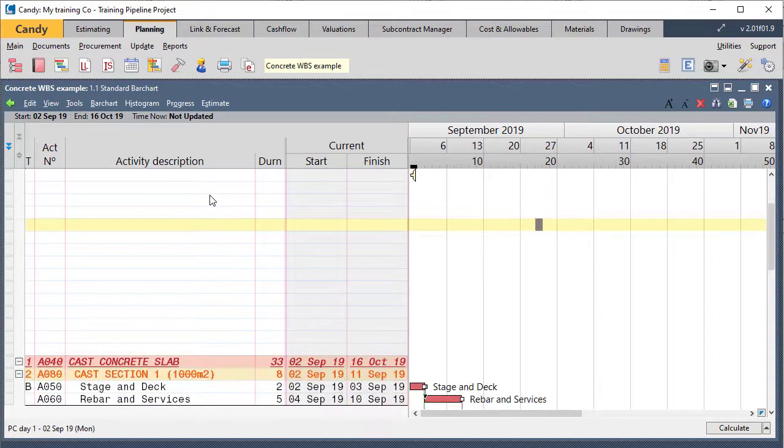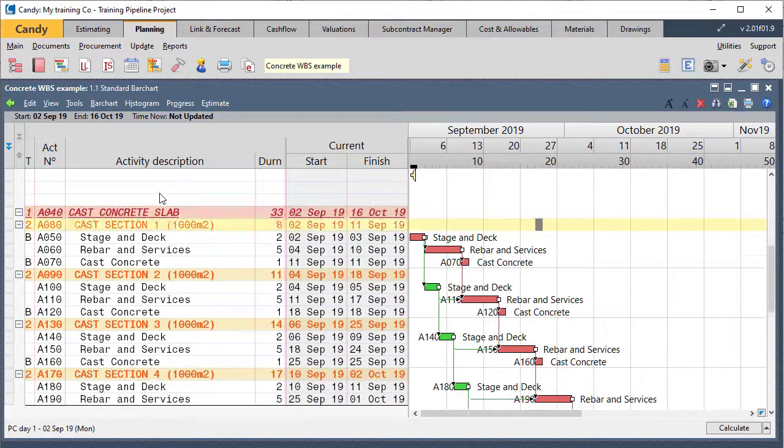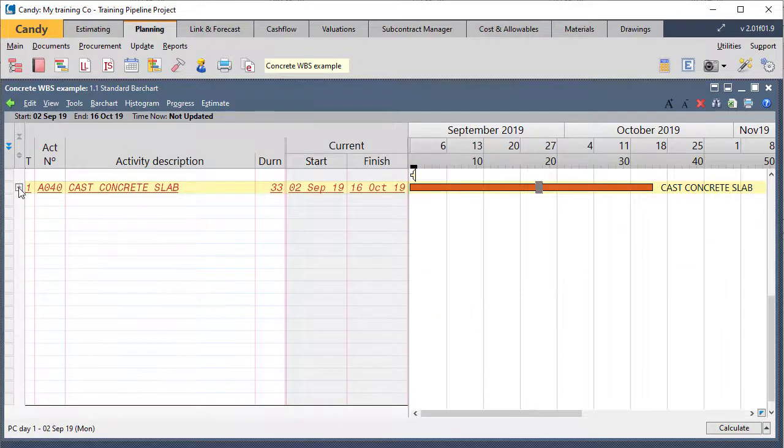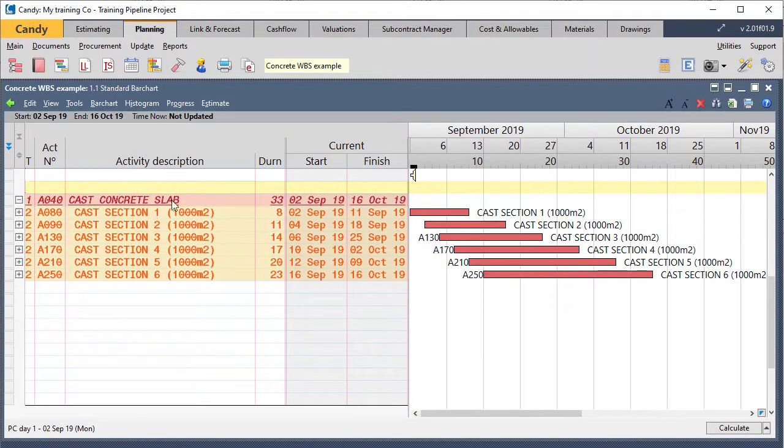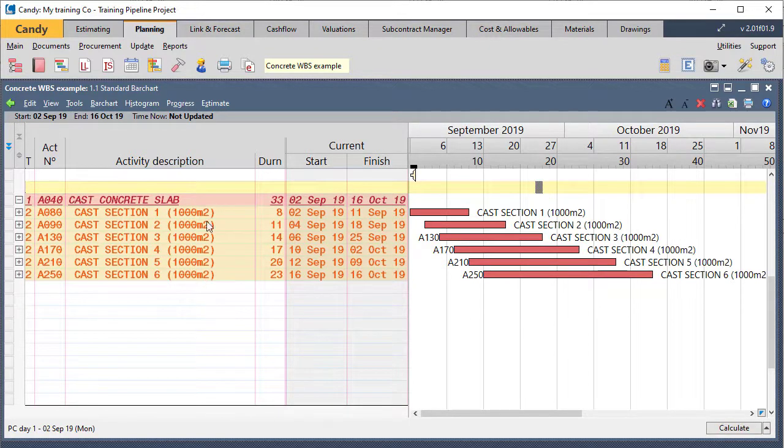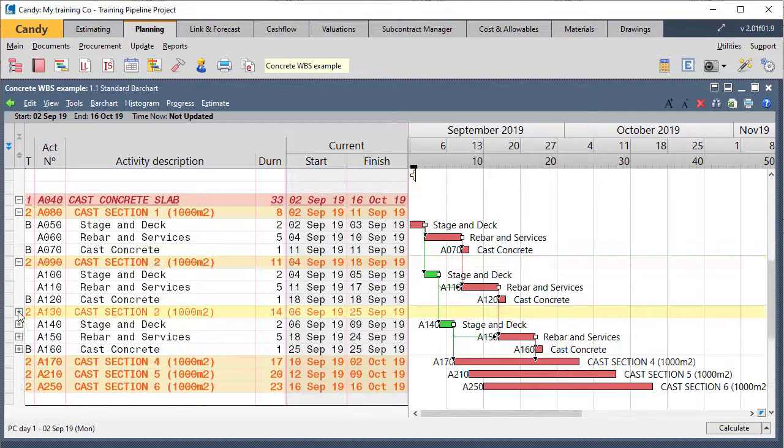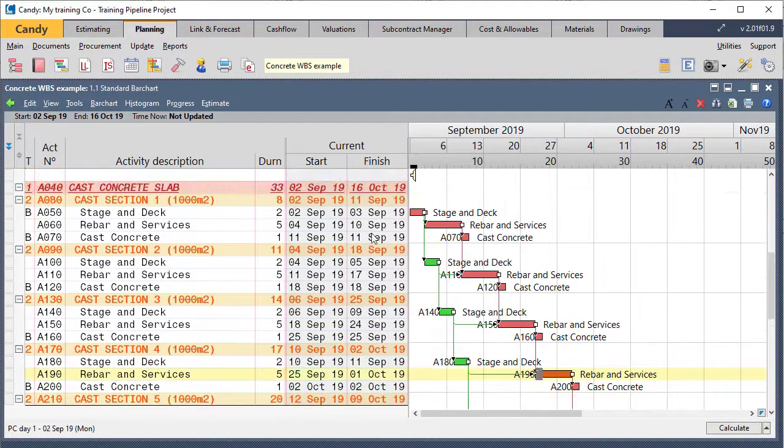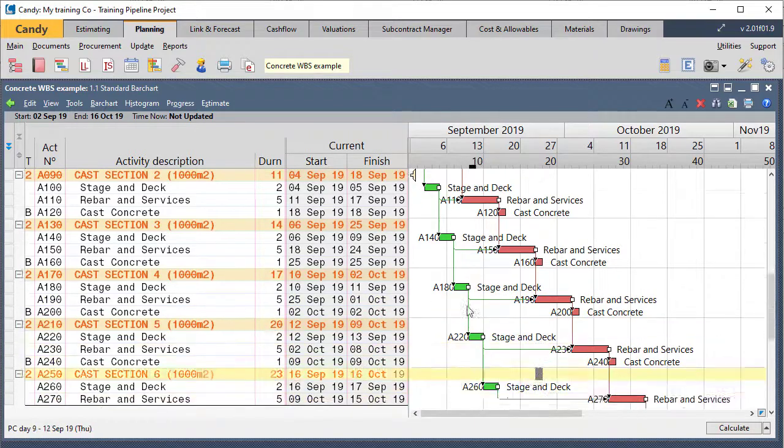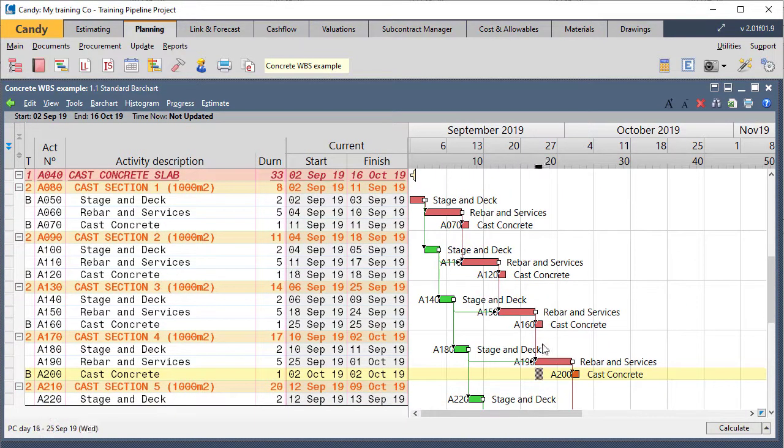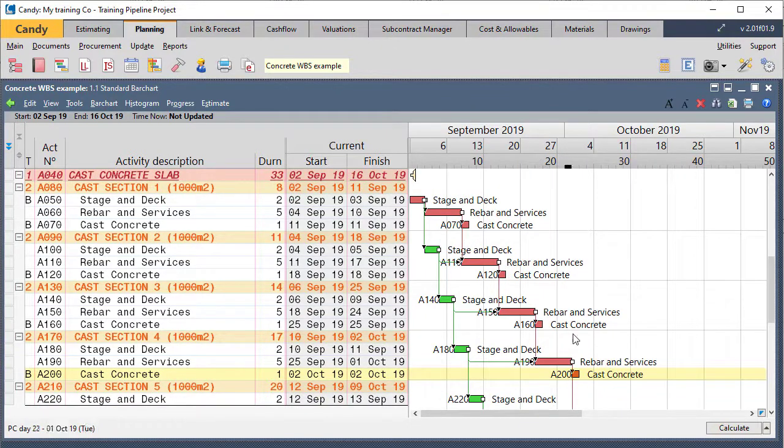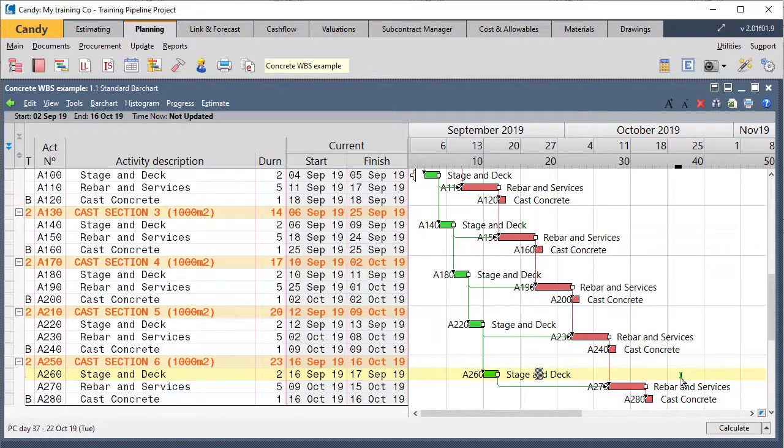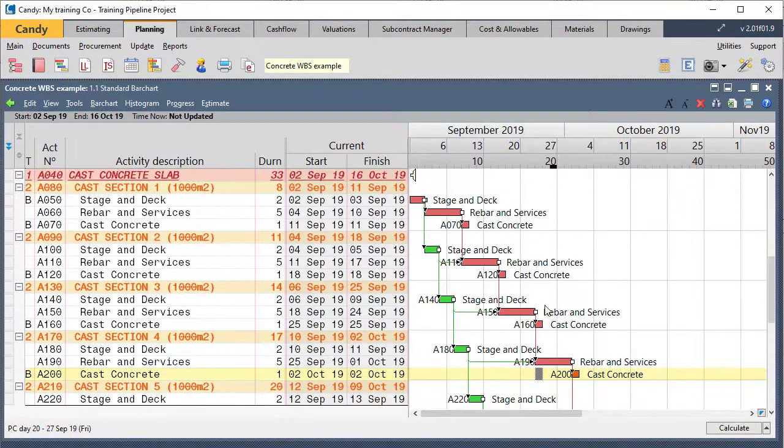Moving down, if we now decide to break this down into more details, you'll see somebody said in terms of works breakdown structure, we're going to have this slab, but then we're going to divide this into more smaller components that's more manageable. Now we increase the level of detail on this slab, and I want you to see the effect of this. We've got staging and decking, that's two days per slab linked to each other. We've got our rebar and services, and then we've got our concrete pours once each and every component has been complete. Now you'll agree that this is a higher level of detail, but we've got much more control.